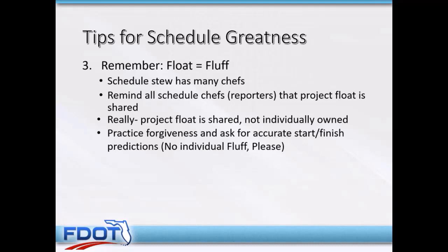It's okay to give what I call verbal float to your director or to your boss. In other words, if you're promised something on Tuesday, you can say, hey boss, it's going to be there by Friday. Nothing wrong with doing that, just to be safe. But when it comes to reporting to the project manager schedule, to the CPM schedule, do what you really think it's going to be. The float's in there, and everybody's sharing that float or that fluff. That life ring is there for everybody, so don't worry about being as accurate as possible. Good things do bear repeating. If it's on Tuesday, say Tuesday.